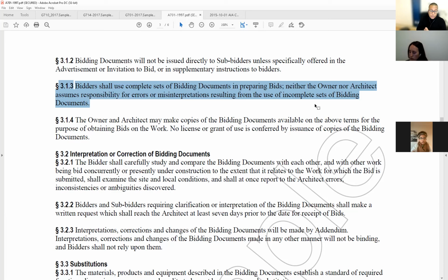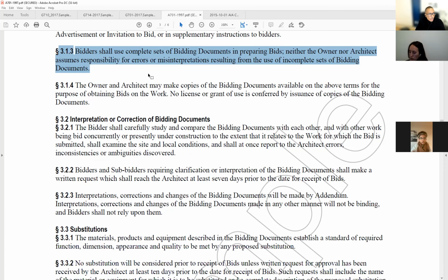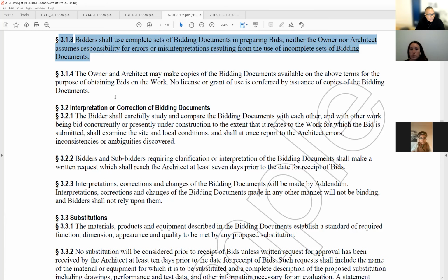In fact, as I said before, they're basically certifying, ascertaining, attesting, I don't know if that's a word, that they're doing everything in accordance with the bidding documents. If the bidding documents are missing a page, hey, there's going to be trouble there. So it is their responsibility. That's why we have a time where they can submit questions and we submit answers by that time.